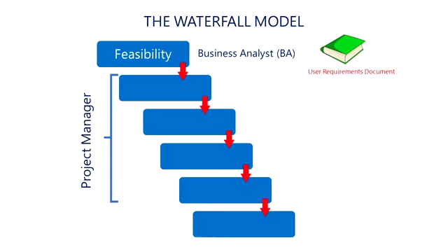Now, what are the deliverables of these two stages? Well, the first stage, after the BA has gone around and spoken to the users and understood what they've said, they will put all their findings into a document, and that document will be called the User Requirements Document. It has other names as well. But generally, here's a document that has collated all the information they found. Now, it's a document that you and I could read. It's written in prose, not too much technology in there.